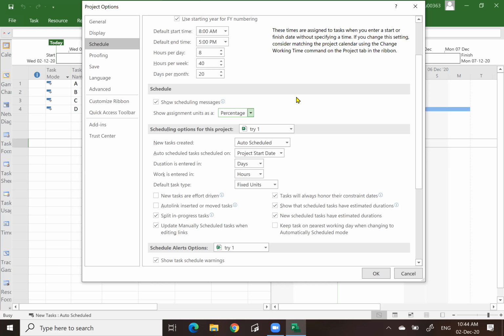So what does 0.5 mean? Is it half of the excavator? Okay, it is not half of the excavator. In terms of timing percentage, meaning 50%, that resource is being used only half a day, half of the working time. That is what is meant.